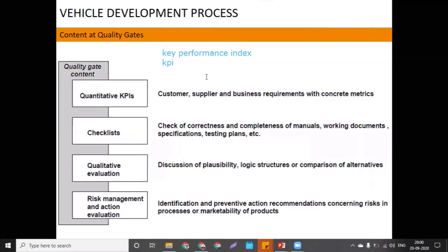Now fine. So each and every OEM is going to follow all the quality gates. Even in India, Force Motors also follows quality gates. So in the quality gates, KPI will be there. Why will the KPI be there? Just to check whether we are going in the right direction or not. This KPI will show you how good you are quality-wise, how good you are in completeness, and how much you are delivering on the right time.